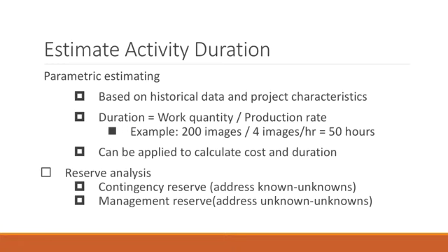The second one, the reserve analysis, is either a contingency reserve or a management reserve. So on the reserve analysis, we address the known unknowns, and that means: what do we know about this particular task? We start with what we know and we develop an estimate based on what we know, and then we account for what we don't know. On the other side, we start with what we don't know, and then based on this uncertainty, how can we estimate the elapsed time of something that we don't know? That will be the management reserve.